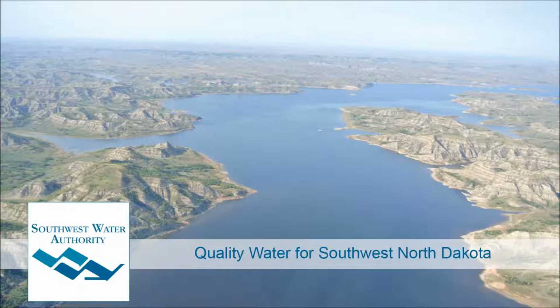We can always hope. Last time we checked in on the supplemental intake going up on Lake Sakakawea, the parts were being shipped over from Europe, and they were somewhere over on the East Coast. Have they got any closer to their destination? Yes, they are on site, and that is the concrete parts for the caisson, which is 22 feet in diameter and 150 feet deep. The ground has been frozen so that they can excavate down to that depth, and so far they have 12 rings out of the 45 installed.